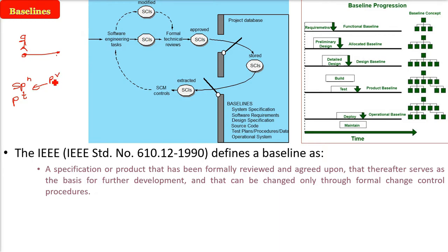And this serves as the basis for further development, and that can be changed only through formal change control procedures. You cannot just change it by yourself. The baselines can only be changed by going through the formal change control procedure. These are called baselines.